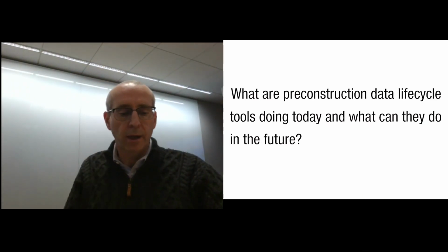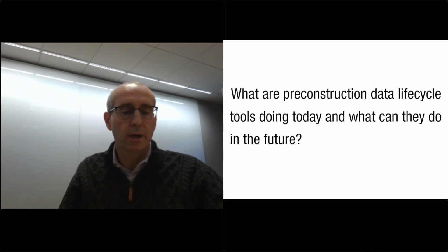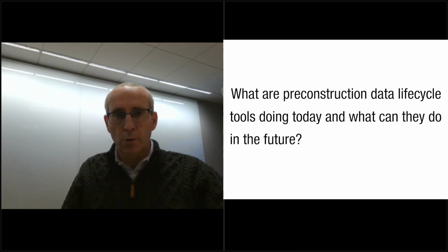So I think a lot of people today, when they hear us talk about pre-construction data lifecycle, jump to cost history. It is sort of the natural thing that most of us in the industry think about. Capturing either final completed costs and quantities and being able to use those for data mining and then benchmarking our next project, or capturing major milestones throughout the project and being able to look at trends.